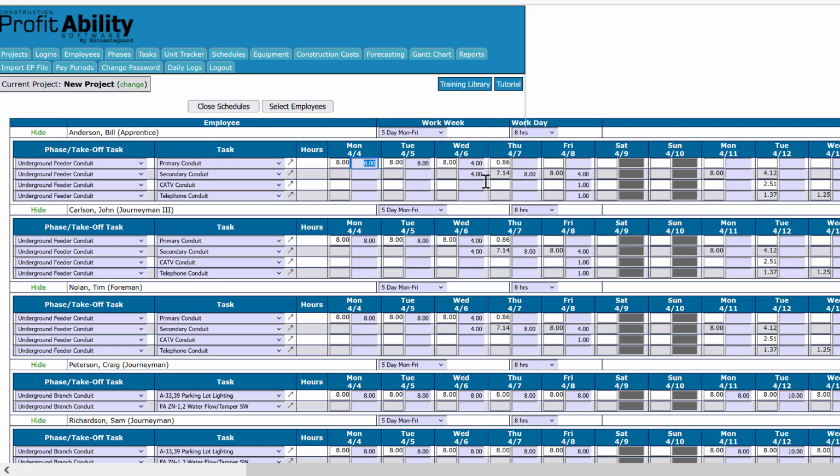But basically, this is where the hours get entered in against the tasks daily, should be daily. And this is the PowerPoint of the whole process, okay? Because we're telling workers what we want them to work on and how much time they have to complete it. When they enter their time against it, they're telling us what really happened on the project. So they're being held accountable. We're holding them accountable to the budget hours and budget dollars without even having to stand there and watch them.